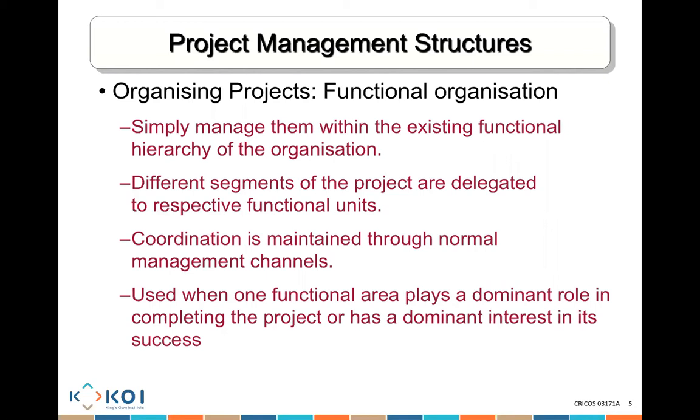So if you have a marketing manager, it's through the marketing manager. If it's the sales manager, HR manager, IT manager, the work gets coordinated through those managers. Use this when one functional area plays a dominant role in completing the project or has a dominant interest in the actual success of that project. For example, if IT has a dominant role in completing the project and a dominant interest in getting it done, then you would organize it so they are probably the first team to initiate and follow up on ensuring the work progresses from one department to another.